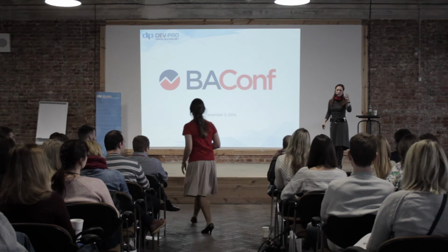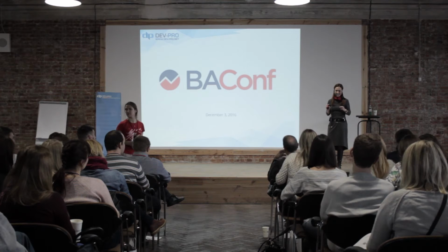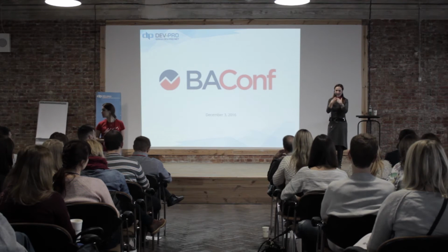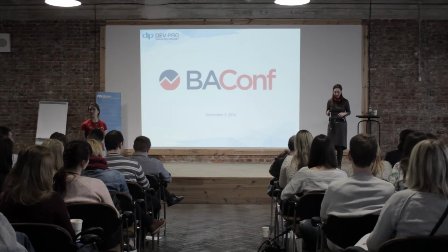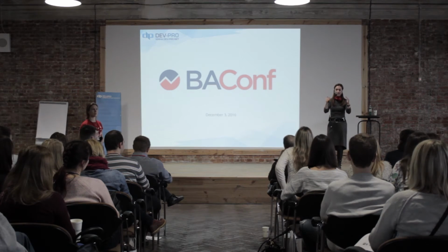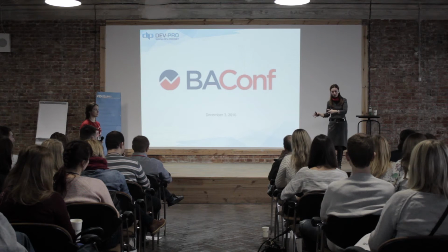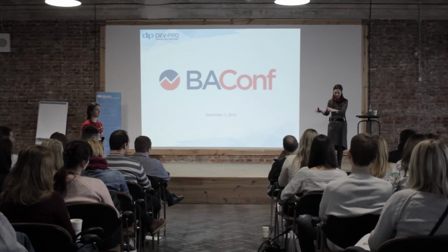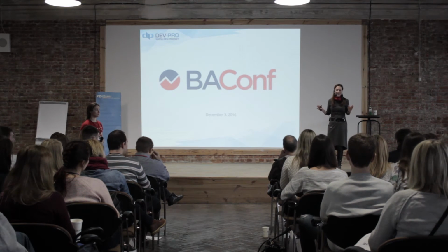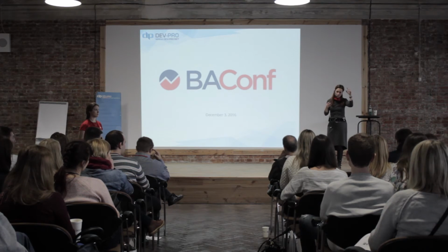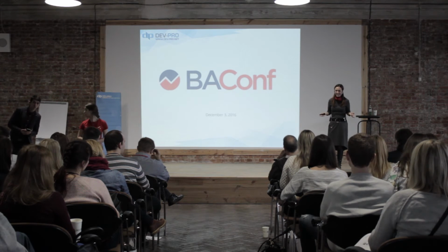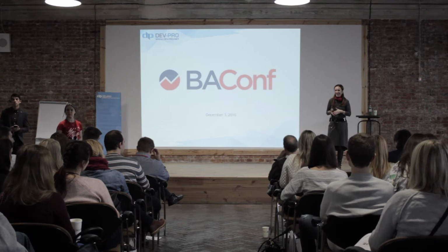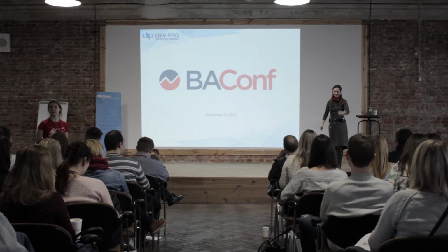This is something that has to do with, let's say, the communication strategy, yeah? So I make it clear. I say, I'm waiting for an answer till, whatever, Friday. If I don't get an answer, then for me and for the solution development team, it means we will do it this way, yeah? Yes or no. And then we have it written, and we have it also communicated probably to somebody from the business, and then it needs to work, yeah. I know this, waiting for decisions. This is a typical one.